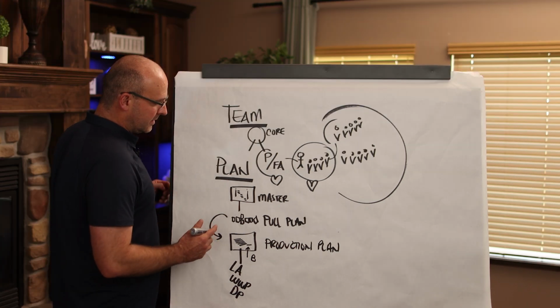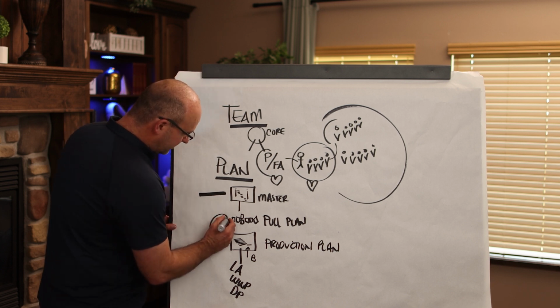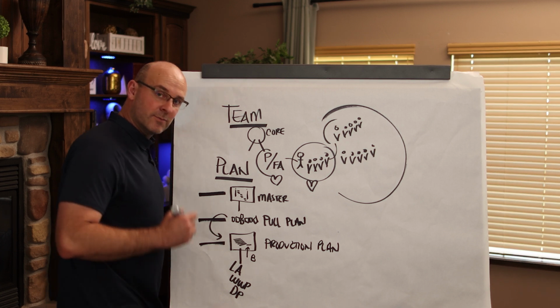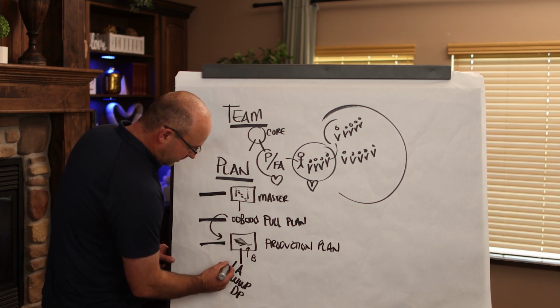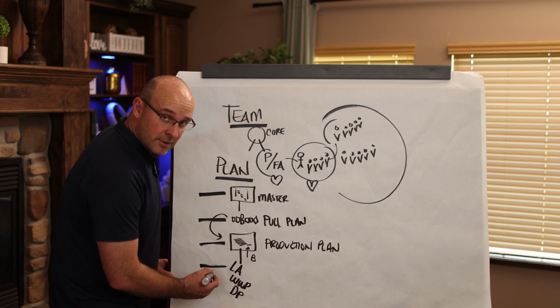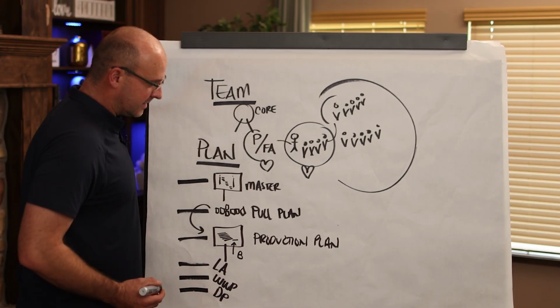But from a field operations standpoint, we must have our strategic planning. We must start to collaborate with boots on the ground. We must have a production plan, which becomes our target. And then the look ahead is for trades to visualize, make ready, look ahead planning. Weekly work plans are for commitment, and day plans are for execution.